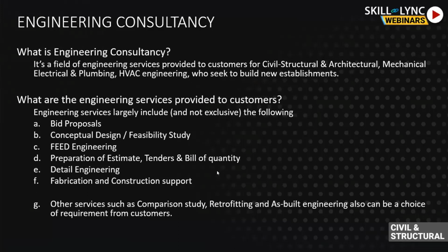Although in this tender I have been very specific about steel structure PEB vendors alone, these tenders can also be prepared for construction companies who provide construction support. When engineering consultancy services do not include any construction support, we could lease these parts of the project to other vendors who would do the concreting work, the foundations, and other site grading works.